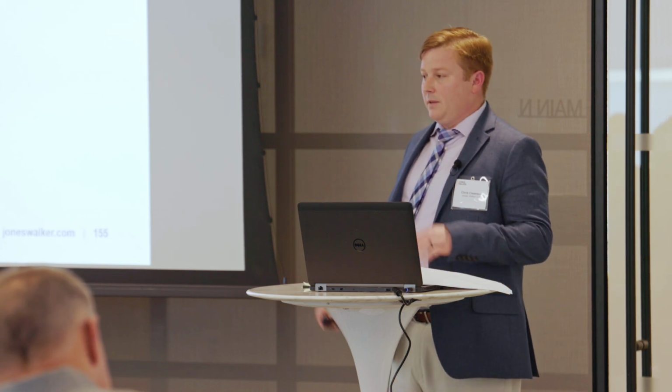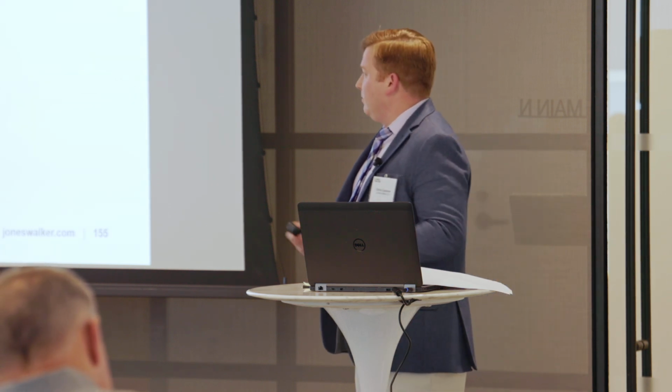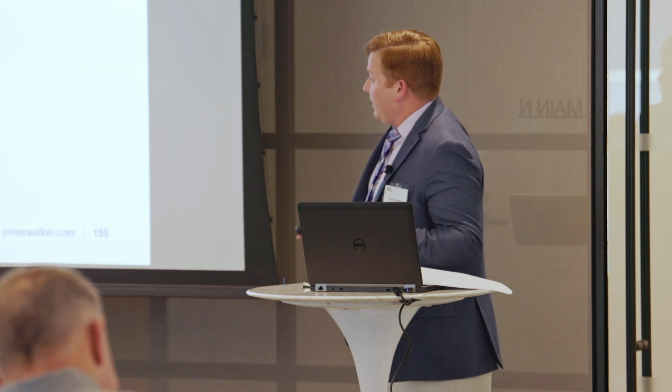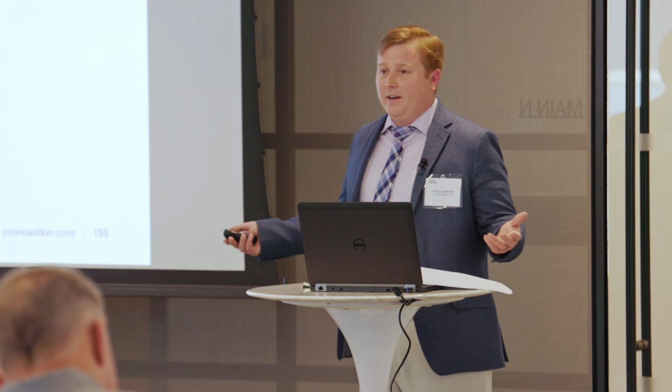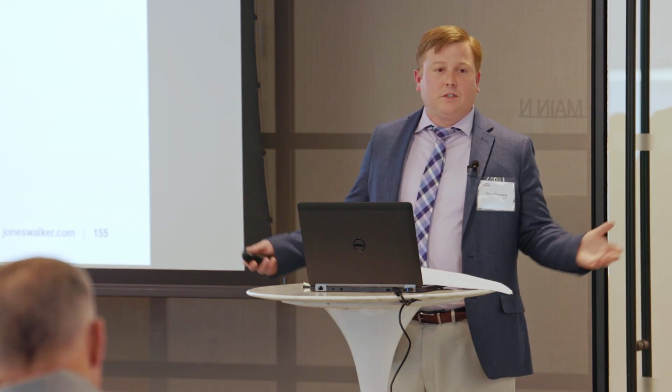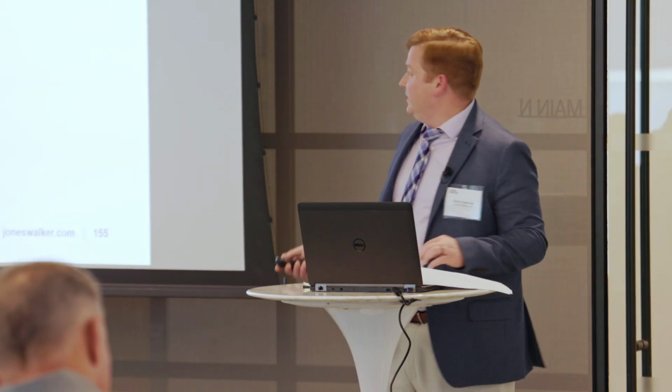The point is that, depending on the doctrine, the superior knowledge doctrine, for example, doesn't require notice. Well, suppose you didn't provide notice that you needed to provide in accordance with the contract, and the court finds the failure to provide notice is fatal to your differing site condition claim. Well, you've got to find another shoe that fits.